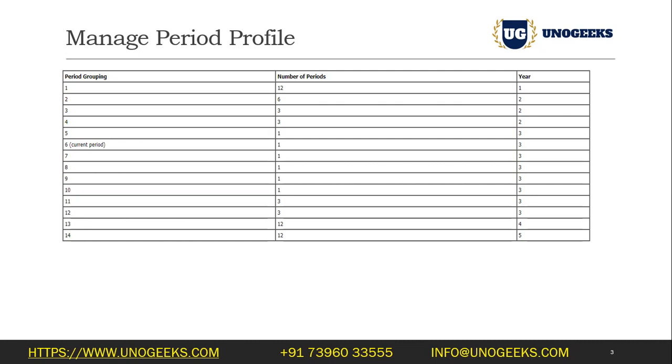We just don't have to put all those logic that they were already doing in the third party. We just have to create an event with that particular amount. That is it. So in such a scenario, you will use event. But if you are using costing and on the basis of costing you will be creating the invoices, then you will have to use the burden there. Okay, got it.